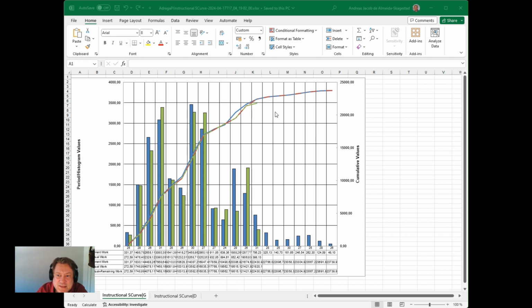The reason for this is probably that we have saved status for this project monthly, while we selected last Sunday of month as setting for this report. It's very important that we use the same settings in the report as the day we actually save status date in the project. So let's change that.